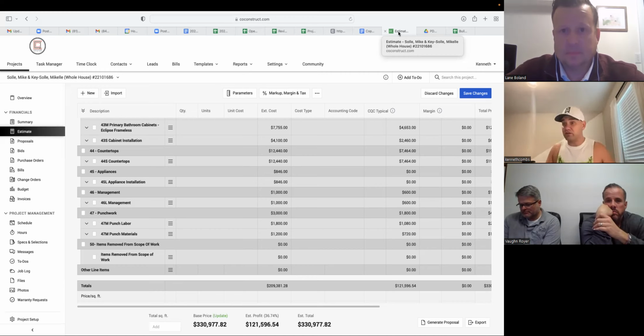I have done a kitchen for your neighbor, because we do kitchens. I mean, we've done projects in all of Durham, right? I did a project for your neighbor that was in the same value home as this, and they spent $150,000. That doesn't mean this kitchen's going to cost $150,000, but it means that your neighbor. Yeah, that could vary 40% based on the quality of the cabinetry and your different selections of appliances.